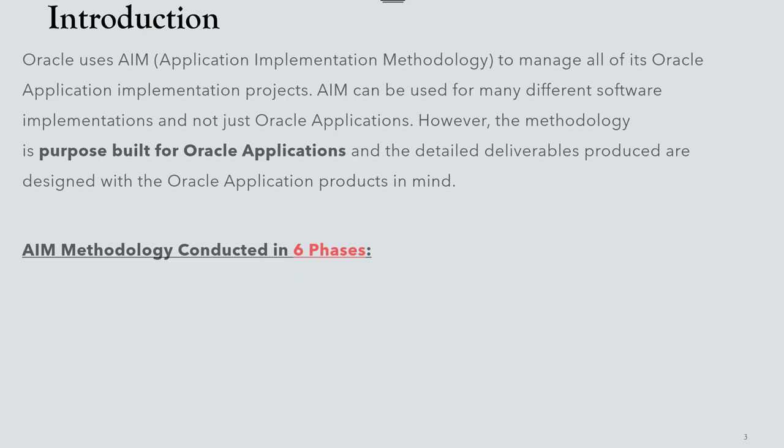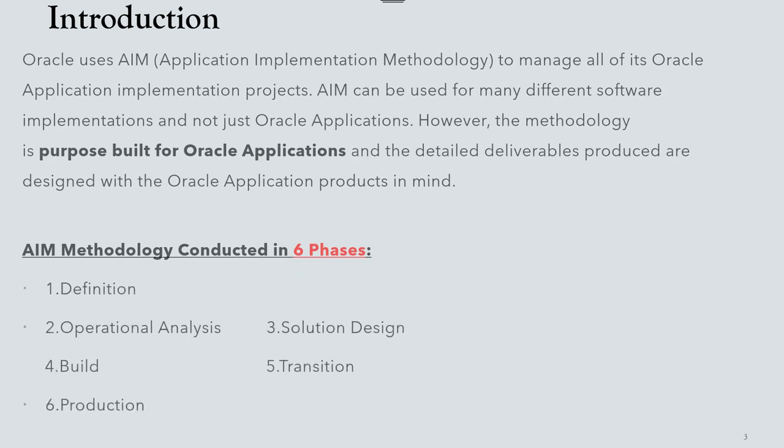AIM methodology is conducted in six phases: Definition, Operational Analysis, Solution Design, Build, Transition, and Production. Starting with the Definition phase: you plan the project, review the organization's business objectives, and evaluate the feasibility of meeting those objectives under time, resource, and budget constraints. The emphasis is on building an achievable work plan and introducing guidelines on how the organization will work to achieve common objectives.